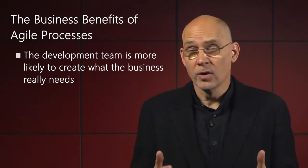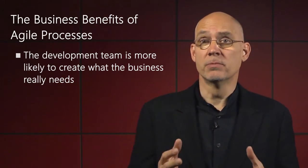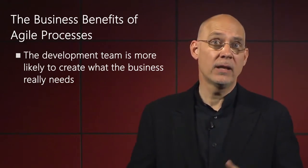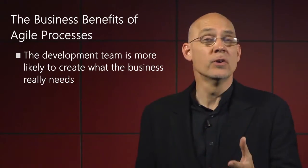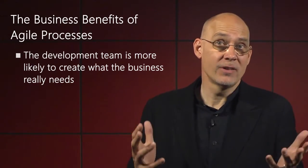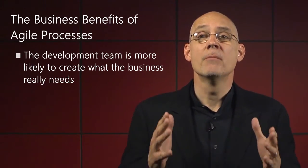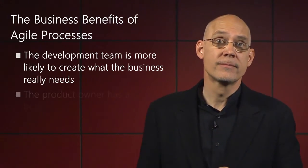The product owner, who represents the business, remember, is directly responsible for creating and prioritizing the items in the product backlog. The dev team builds the most important things first, and so the sponsor is much more likely to get what it most wants, even if it can't afford to get everything. And because the process is iterative, there are many chances to make changes, even near the end of the project.